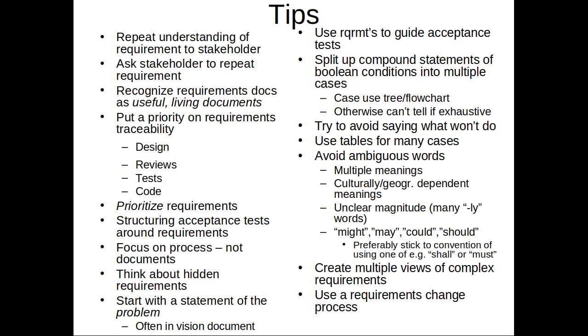I'd say, yeah, sure. But I should have gone through the project manager, because the project manager actually knows what they're paying, and whether they need to be paid more. Maybe they're really underpaying for their contract, in which case he could go back with a strong case and say, look, you want this change, time to talk about more money, or time to talk about more time. He's the one who can take a view of all the different developers and say, wait a minute, we're getting a lot of change requests. Let's batch these up, or let's prioritize them. Maybe my boss, maybe she's the one who knows what we're going to be working on next for another client and says, this is important to this client, but we're keeping this other client waiting. And maybe she says, look, all these change requests need to go in the next contract, not now.